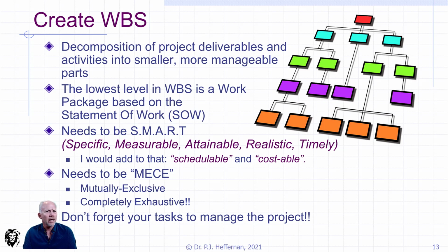To me, when I look at my work breakdown structure, what drives my thinking is: do I have it sufficiently refined, or do I have it over-refined? Is it schedulable at that work package level, and is it costable? Can I estimate it? If I can do those two things, I'm probably getting pretty close to the level of refinement that I need in order to do my next task, which is to schedule it.